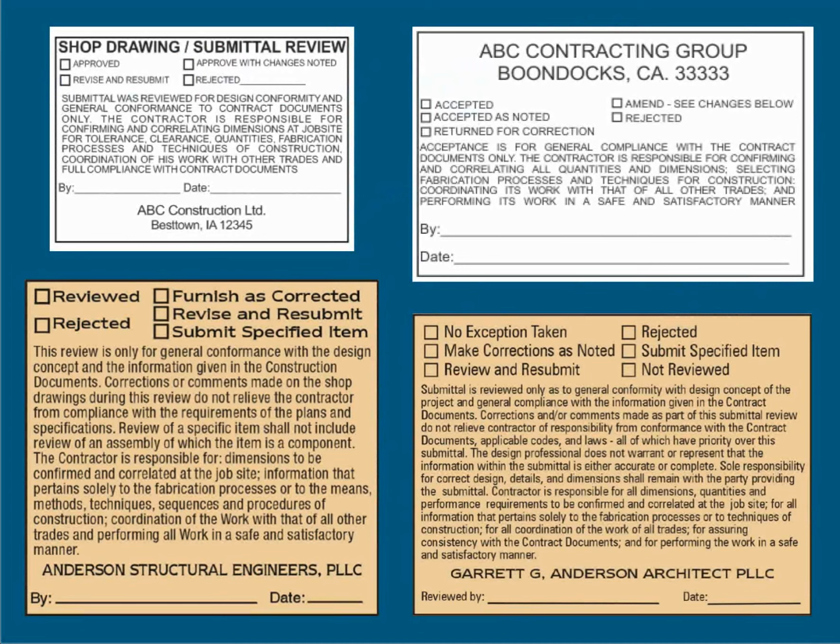That might lead to a meeting with that particular provider or subcontractor. And if they aren't qualified, then that could add up to them being removed from the project and one who does meet the qualifications being brought in. That's not something to shy away from. If they truly are not qualified and don't meet the specifications, then you have the grounds to say they can't do this work.